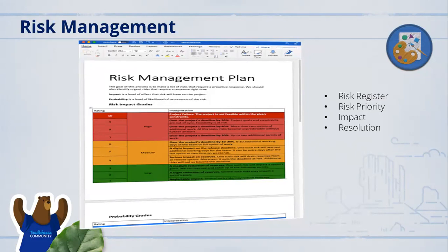And at the same time, post implementation integration, say for one customer, you can identify what were the risks that actually happened or which led to a failure. Basically, you can at least cover and mitigate those for further implementation integrations. So it's ideal to maintain that register and look at it from a process perspective during the implementation integration project.